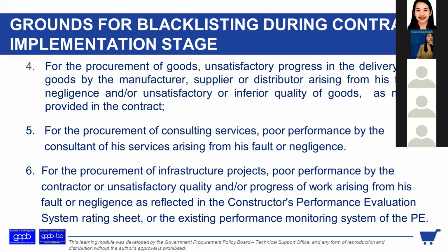Walang naipakita, walang na-deliver. So although they are free with their time, it doesn't mean we cannot ask for regular updates, and it doesn't mean na pag nag-fail sila mag-deliver ng critical outputs, we cannot impose sanctions. So now, and another also specifying, for example, yung mga design and build na mga projects, specifying materials which are inappropriate, substandard, or way above acceptable, or way below acceptable standards.